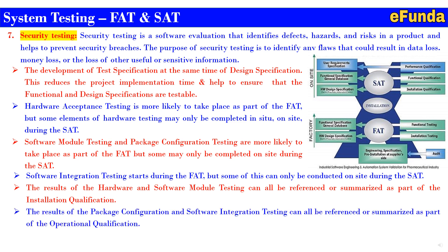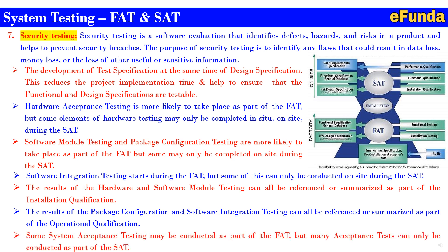The results of package configuration and software integration testing can all be referenced or summarized as part of the operational qualification. Some system acceptance testing may be conducted on-site, but many acceptance tests can only be conducted as part of the SAT. One can correlate all these details with the reference figure from industrial software engineering and automation system validation for the pharmaceutical industry, used here as an example.